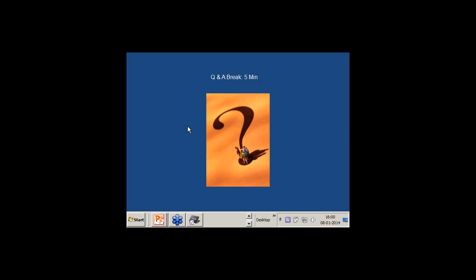Very well. So you yourself have given me the solution. Since the things are very dynamic, if we can just make the work environment transparent, if we can place the visual controls and declare our WIP limit. So even if you are working on more than one project, you can declare that this development team can take only 5 tasks in a day. And if they are exhausted with this WIP, the simple principle is that we should not give more tasks till this work is moved to the next stage, because we focus on keeping the work in progress or inventory to the bare minimum.